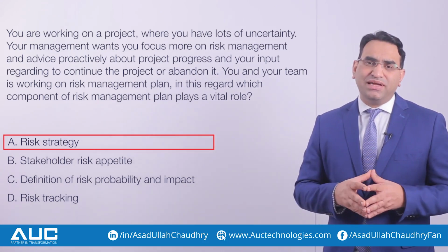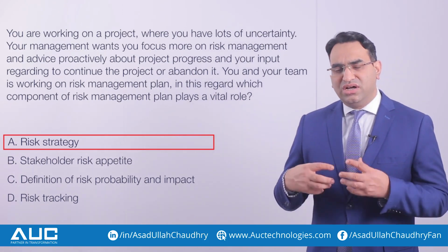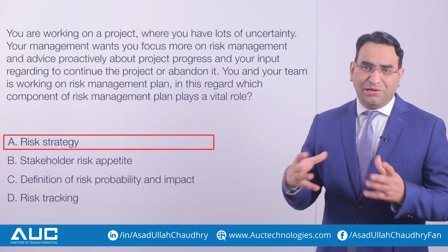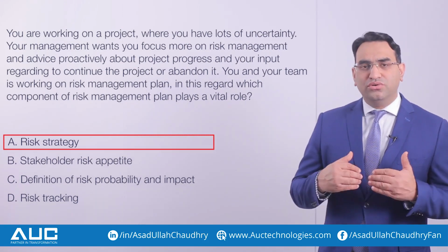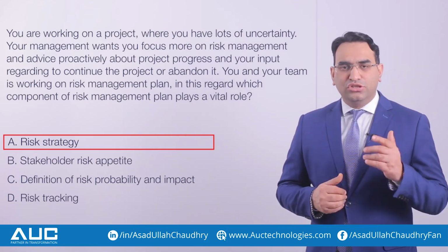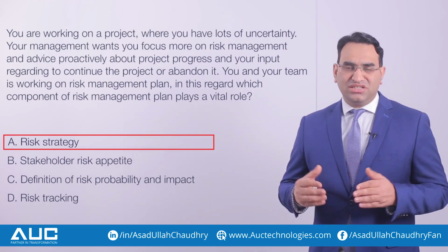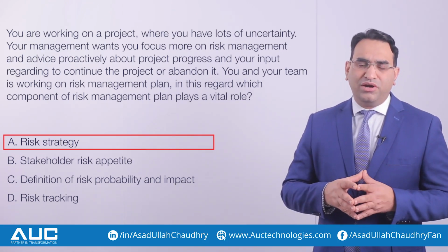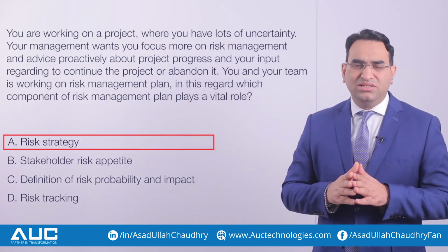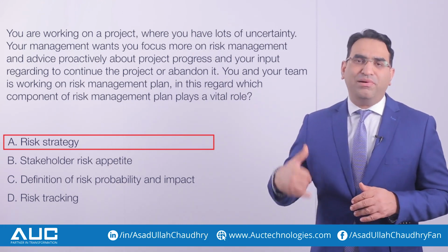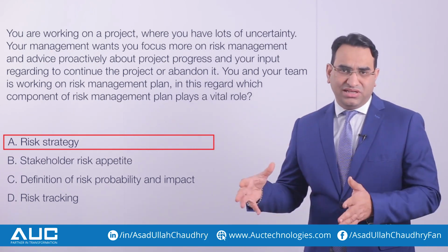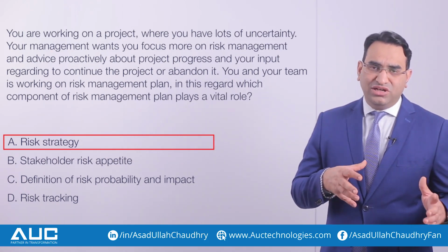You see, risk appetite means how much risk an organization or individual can take on. What is their capability or capacity? So if you want to understand the project value, one way of seeing the value is through risk appetite. So maybe your organization says that for you the project is of say $200 million. If you consume all $200 million, it means we are not going to continue the project past $200 million. Maybe they say, okay, if you want more money I can give you, but the scope should be there, or maybe time should be achieved within that.